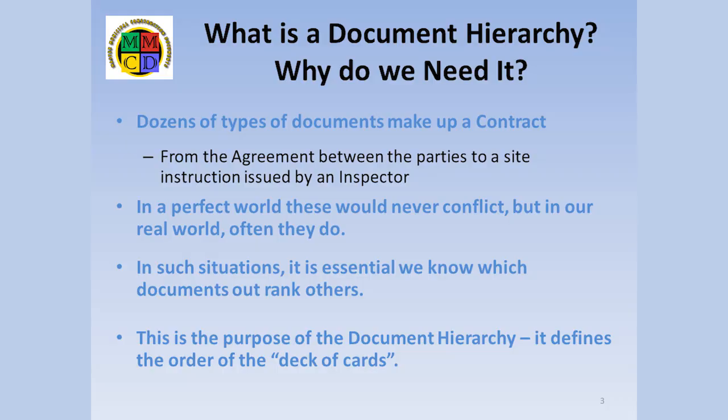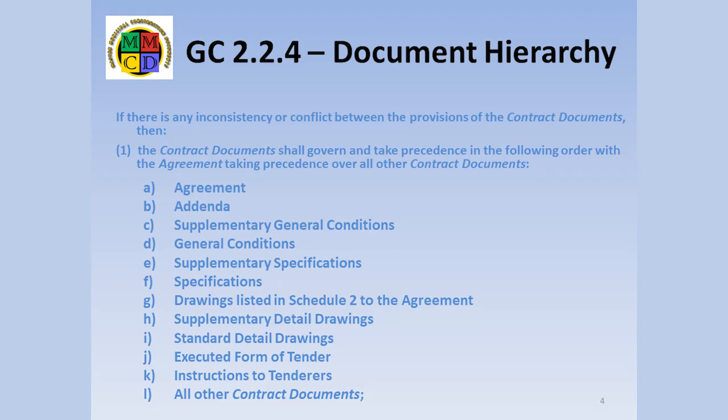The document hierarchy defines which documents are outranked by any given class of document. In the MMCD Platinum Edition, the document hierarchy can be found in General Condition 2.2.4. Section 1 of the clause sets the ranking with the agreement as the highest ranking document. Following that are the Addenda, the General Conditions, the Specifications, the Drawings, the Executed Tender, the Instructions to Tender, and everything else.